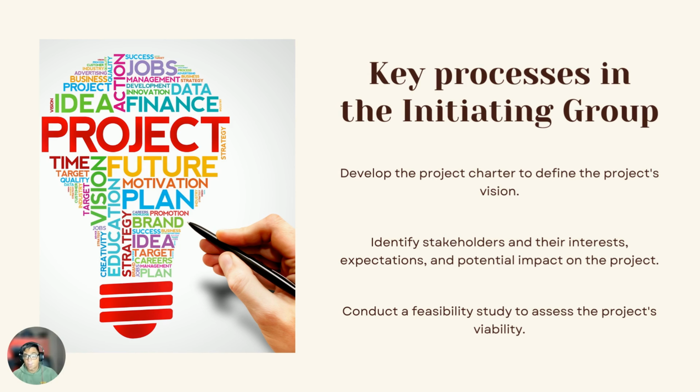Identifying the stakeholders. When you're identifying stakeholders, that's the project owner who ultimately is the company, and the project sponsor who's the one that's actually investing the money and putting that money towards the project. But you have what we call stakeholder engagement. That's going to provide you an idea of, okay, do they need to have information? How often do they need it? Do they want it through email, phone calls, or other mediums?